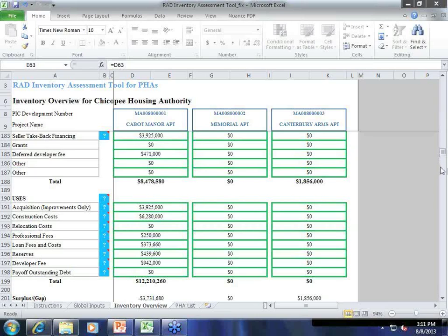And then the second issue would be that often lenders will not accept appraisals done on someone else's behalf. So you might go ahead and order an MAI appraisal and have to pay for it, and then your investor or your lender will come in and say, oh, sorry, that wasn't our guy who did the appraisal, so we're going to do it again, and you'll get to pay for it again. So I would really urge you to wait until you've got your CHAP in hand and you're moving forward with an investor and a lender, and make sure that they approve whoever does it so that you don't end up paying for it twice.